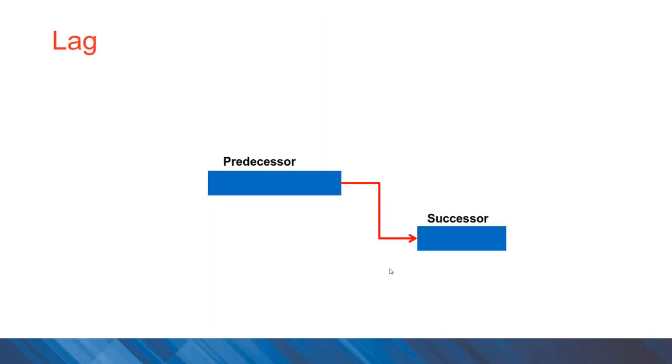The concept of lag is important in network scheduling. We have waiting time or idle time between certain activities on the project. If you consider a construction project example when you have concreting, there might be a waiting time required for the concrete to set and reach the desirable strengths before the next activity or loading on the concrete can be done.